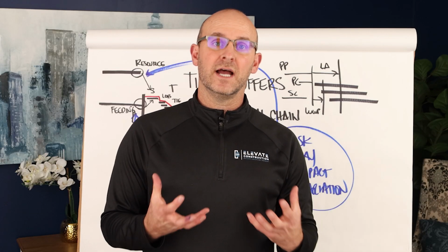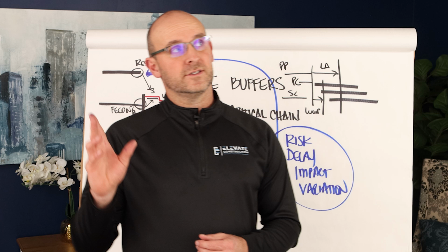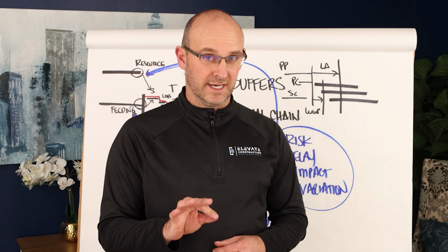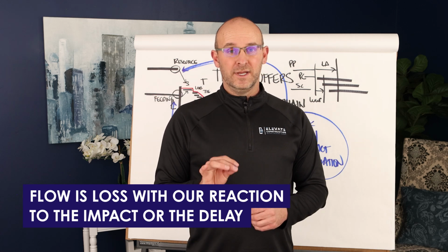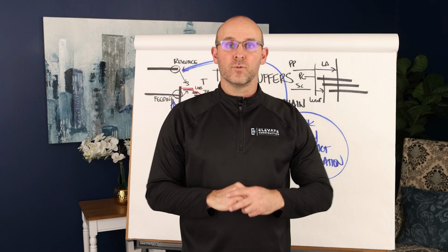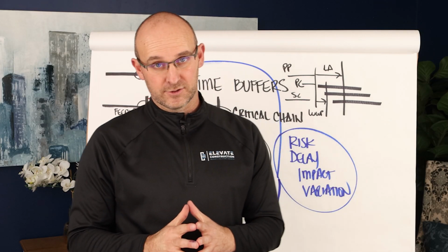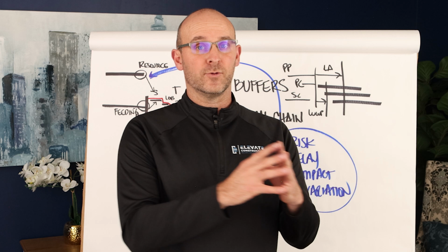And buffers allow us some flexibility to maintain flow. Flow is not lost when there's an impact or a delay. Flow is lost with our reaction to the impact or the delay. Meaning if we start to stack or burden work, that's when we enter into a downward productivity spiral, and that's when we get in trouble. So it's not the delay or the impact that's going to mess up our project, it's our reaction to it.